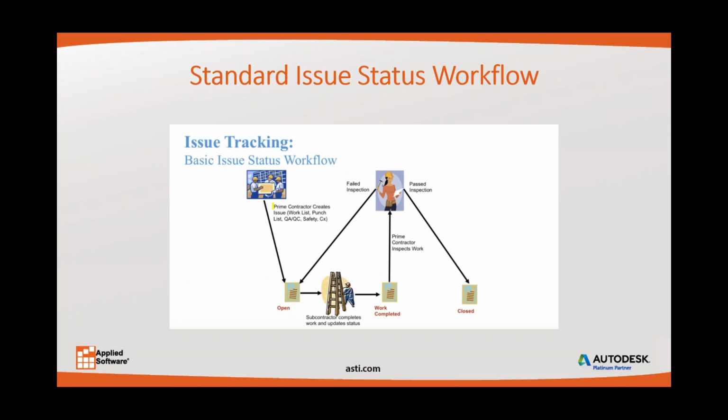So this is the workflow that we're all used to with BIM 360 Field. The prime contractor creates the issue. We set the status as open. That's an indicator to our subcontractor that he needs to work on that issue. When he's completed it, he marks it work completed.